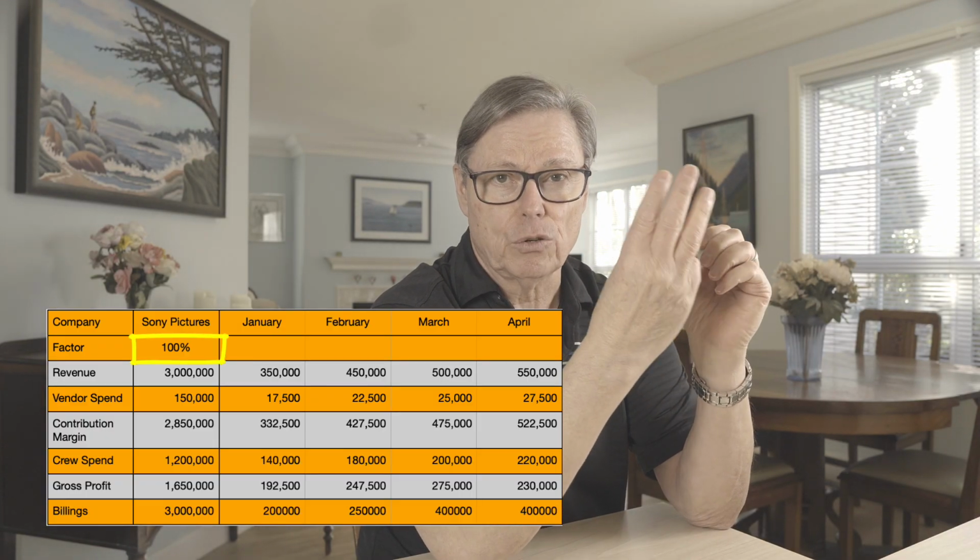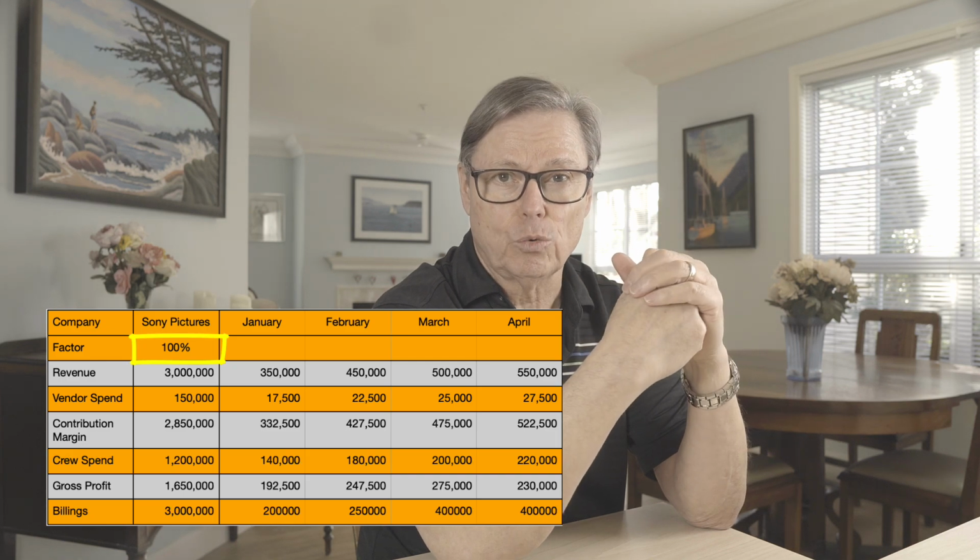As we saw in video 3, $2 million of monthly show revenue achieves an optimum utilization of Blue Pony's compositing team. Blue Pony has set up their crew complement so their compositing team is the drum in their workflow. They have 21 compositors in their crew complement. To fully utilize these compositors, they target $4,800 per day of show revenue for each compositor. This works out to an average of $2 million of show revenue per month.